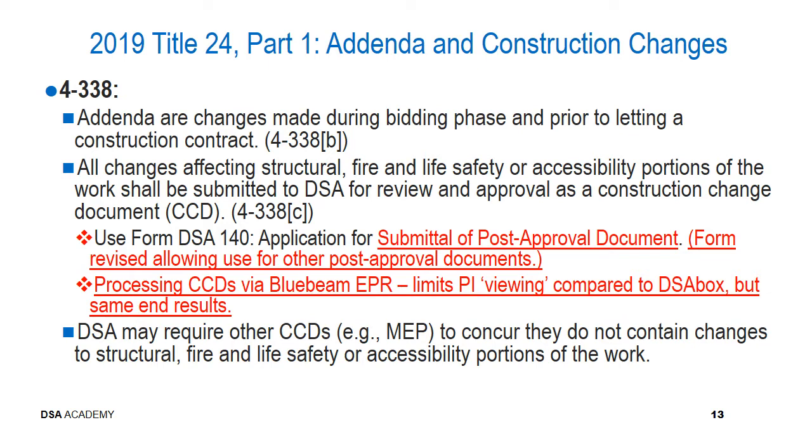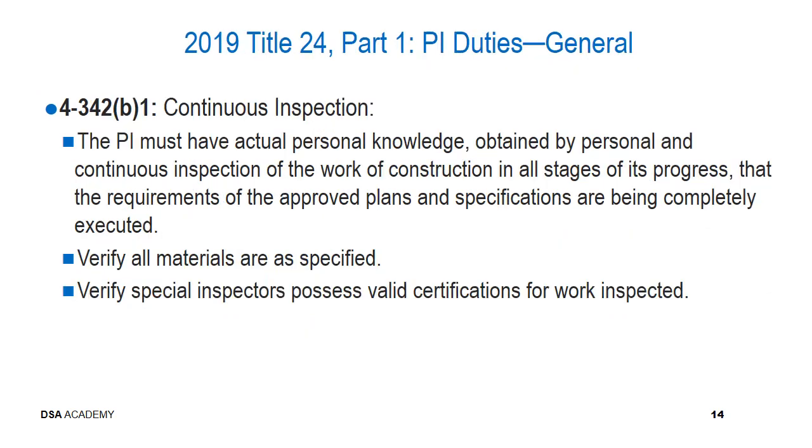DSA may still require other CCDs, such as those in other disciplines, such as mechanical, electrical, and plumbing, such that then we can concur with the design professional that they do not contain any changes that affect structural, fire life safety, or access portions of the work.